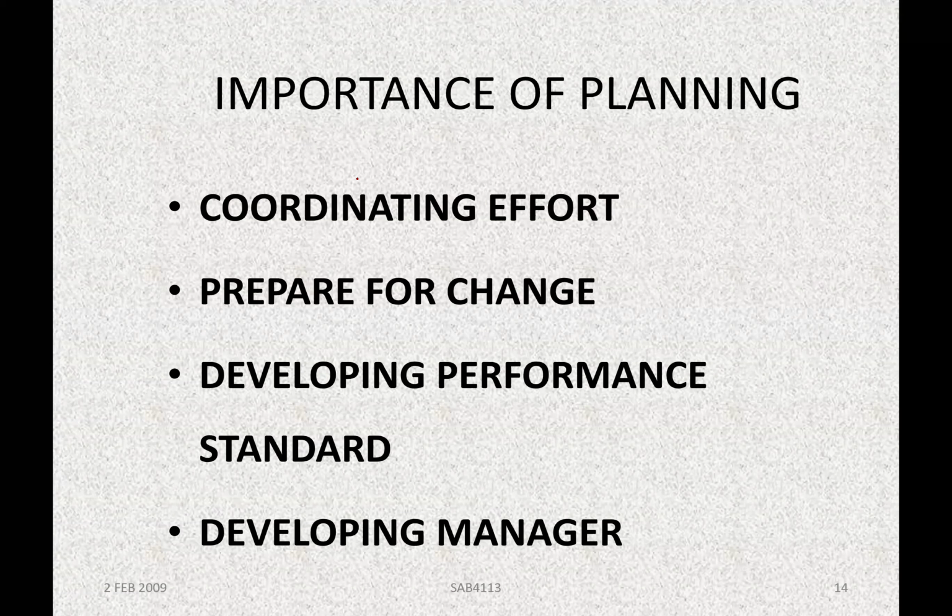Importance of planning: coordinating effort. Sometimes planning is done by the project manager or engineer. Okay, so one of the job functions for an engineer is to do planning. That's why we need to learn this, because you plan, you put in the thinking, and then you pass the planning to the supervisor. Then the supervisor will break down the work to be passed to the foreman, and then the foreman will get the workers' leader and tell them what to do, etc., in terms of daily work. But everybody will be delegated some kind of work. The most important thing is everybody works for the sake of the project. The project objective is only one. At the end of the day, that building must be completed. But then you can break it up in order to delegate the work. So coordination is very important.